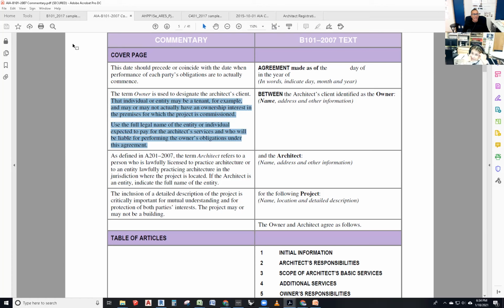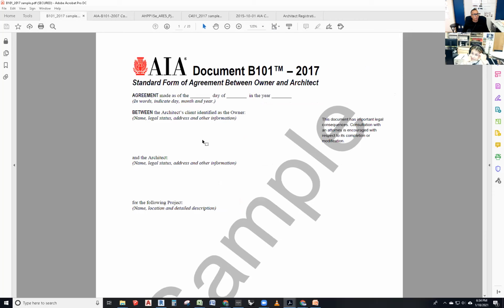But going back to these, we're going to go through these as much as we can today, and I'm going to try to be rapid speed. Things that go in a contract. Dates are critical. Who is the contract written between? Is it written between such and such and such and such? Information about the project and addresses, like who's the address, what's the address, things like that. A contract without a date and without names, it's not a contract. It's just a blank piece of paper.